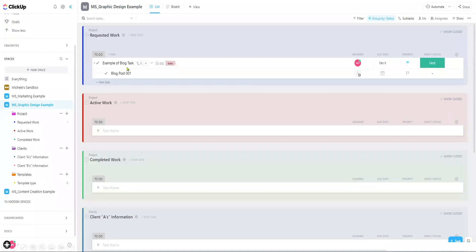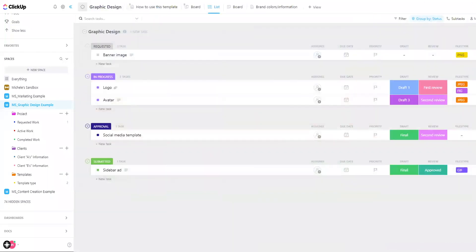Tasks are created for each project with subtasks for the deliverables. Each project should be created from a template for consistent project management. Custom fields often used in graphic design could include due dates, graph status, review status, and file type.